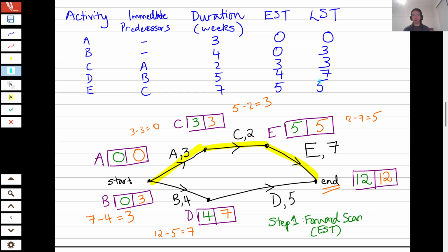We then worked through a few examples where we broke up the process into a few steps. The first step was to write the boxes. You must make sure that you write the box for every activity. If you do that, you won't run into any problems. Next, you needed to do the forward scan, which started on the left and finished on the right. Then you needed to do what was called the backward scan. This time you started on the right and finished on the left.